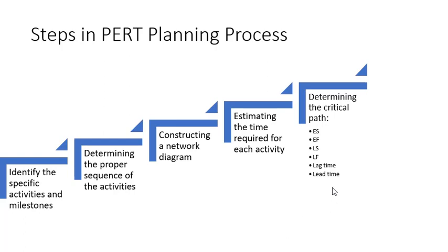And similarly, we have lead time, which is a modification of a logical relationship which permits an acceleration to the successor task. For instance, in a finish to start dependency with a 10-day lead, the successor activity can start 10 days before the predecessor activity has finished. So that is referred to as your lead time.